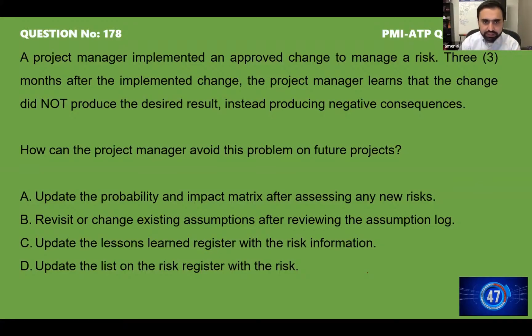What happened? Okay, let's take a step back. What happened when you implement a risk response? What is the next thing you should have done? Risk register? No, no. You implement a risk response. After implementing a risk response, immediately we do something. What do we do? We reevaluate the risk. Yes, Nawab, risk assessment. We reevaluate the risk for two things. What are the two things that we need to look for?